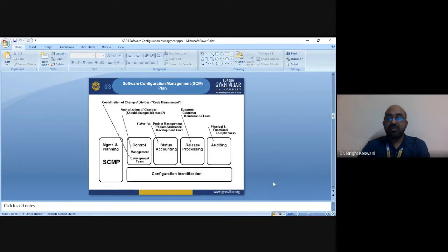It is expected that the board will meet either on a periodical basis or whenever a key change or group of changes requires consideration. The project manager will act as its facilitator and will serve as the focal point for collecting change requests and coordinating change board meetings, and he is doing similar other activities also.